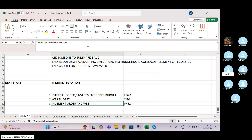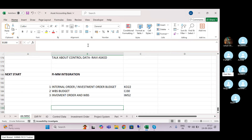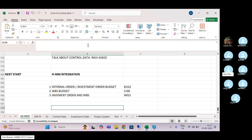So whenever you are in the AUC process, what you are doing is: you are booking the cost in the cost object, and from the cost object you are settling to AUC, and then settling to the final asset.